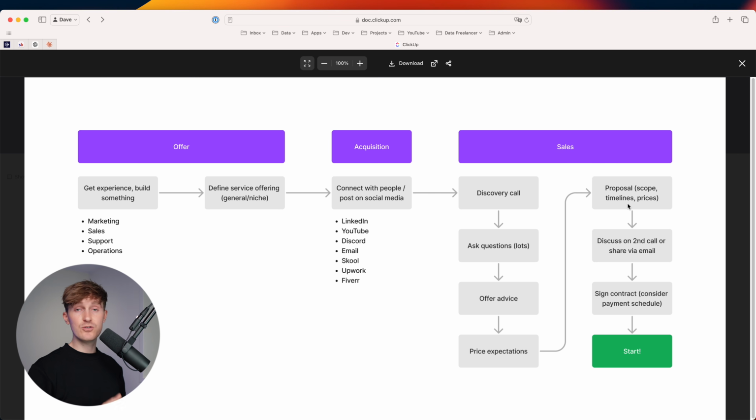What we usually like to do is fixed prices in set intervals. So for example, we sell a proof of concept, we sell an MVP, we for example put 4 weeks on it, 6 weeks on it, etc. to clearly define the scope. But talk about it on the first call so they know what to expect.